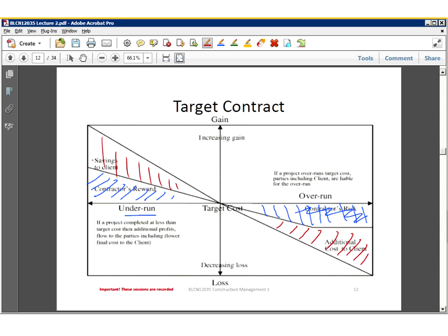All right, so these are the things that make this contract really interesting. What's the biggest problem that you guys have encountered with a pain or a share, gain and pain type contract? What's the biggest problem that you guys have encountered? Anybody? It's a nice tool for working together and making sure things happen, sharing information and all of those, but it's really heavy on admin. All right, so it's really heavy on admin from the contractor side.